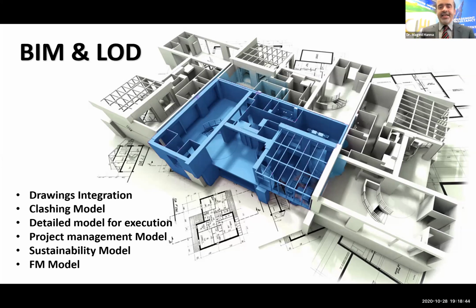Now, it's the same thing here in BIM. If you have a great, nice design and model in the beginning, but you don't integrate all the changes as they are happening, then your as-built BIM model will be totally different from the original model. And then again, we will not have the benefit behind why we integrate the building information modeling system.